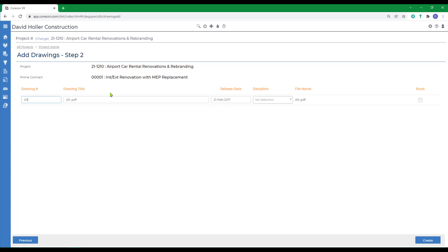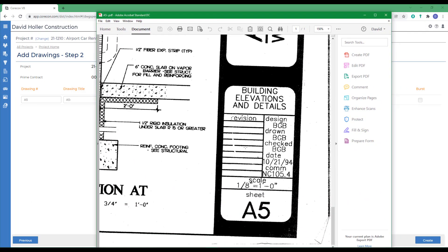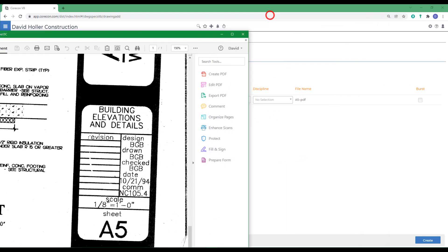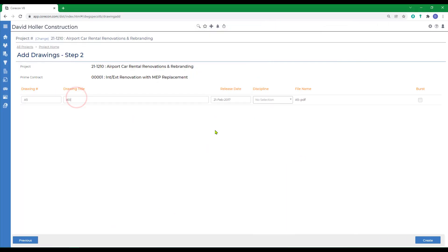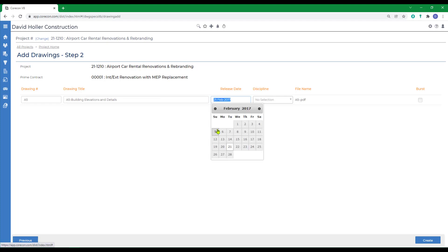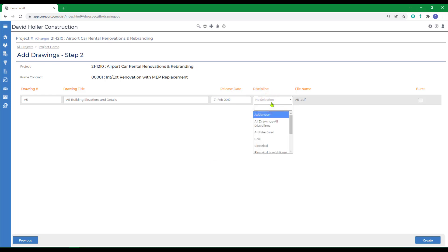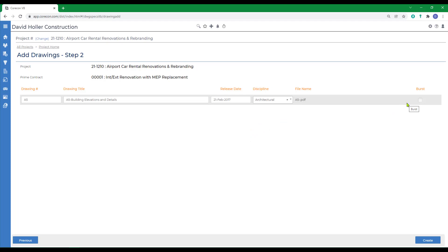Then click Next. It's important to get drawing titles correct. These appear throughout CoreCon, but especially on prime contracts and subcontracts. Most prime contracts and subcontracts have a reference to a list of drawings. We want to clearly show how those drawings are titled. If we look at the bottom right-hand corner of that drawing in the Architects panel, we can see the title of this document. So we're just going to call it A5 Building Elevations and Details. We'll also adjust the most current release date or revision date, select Discipline. And if this PDF file included multiple pages, and you choose to break those into individual pages, each with its own individual file, you have a bursting option. Then click Create.